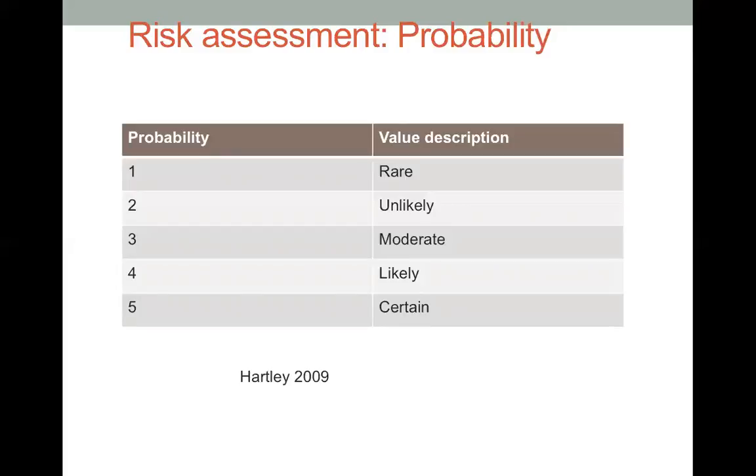And again, this is the 5x5 matrix I suggested last time, and I would bring this again to our discussion, because this helps us understand the risk events in a more sensitive way rather than a 3x3 matrix. Rather than assessing them as low, moderate, and high, we can map them using a 5 rating scale, from 1 to 5, for instance. And we normally say 1 is rare, 5 is quite certain in terms of probability or likelihood. Okay?